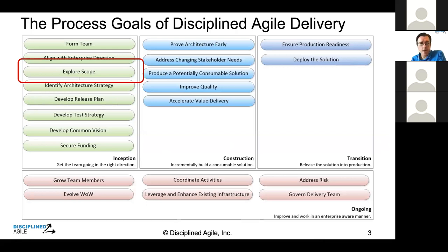There's also a technique called weighted shortest job first that SAFe has made popular, WSJF. That includes considerations like lost opportunity cost and job size in your prioritization. It's a bit richer than just t-shirt size. So you have options. Okay, and a question from Drennan.